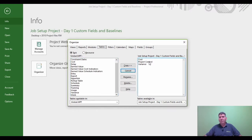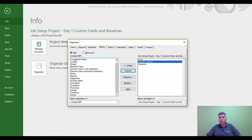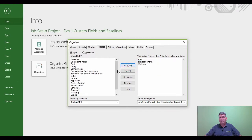So I want to copy the project control table from the job setup project to the global, which is Microsoft Project. So with project control selected, I'm going to choose Copy. Now I can see the project control is now in Microsoft Project itself, which is the global MPT.